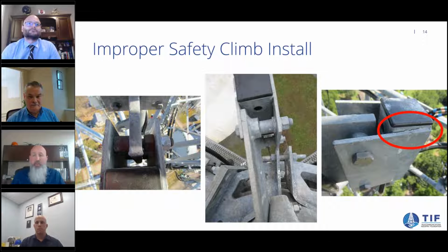That is 100% correct, Justin. There are more times than I would like to count where we show up to sites and are not able to utilize the safety climb that is on the tower. And like you said, we have to come up with other means of fall arrest. It adds time into the job. It adds planning time into the job. And that cost can potentially end up being spread across multiple stakeholders that are trying to get the same thing accomplished.